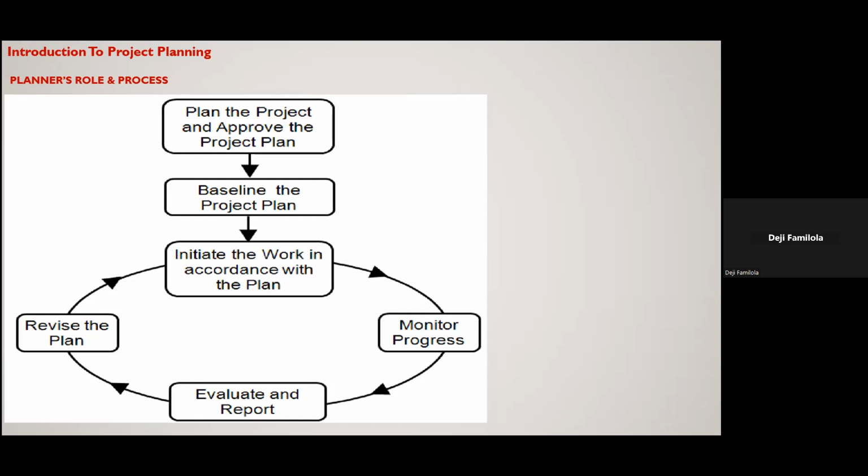Then they will ask you, okay, if we do these, can you give us a scenario plan to see how we can recover? What can we do? People will start suggesting, oh, can we do this, do this, do this? You can say, okay, let me give you a scenario plan. You can have three or four scenarios for how you can recover back to the end of July.